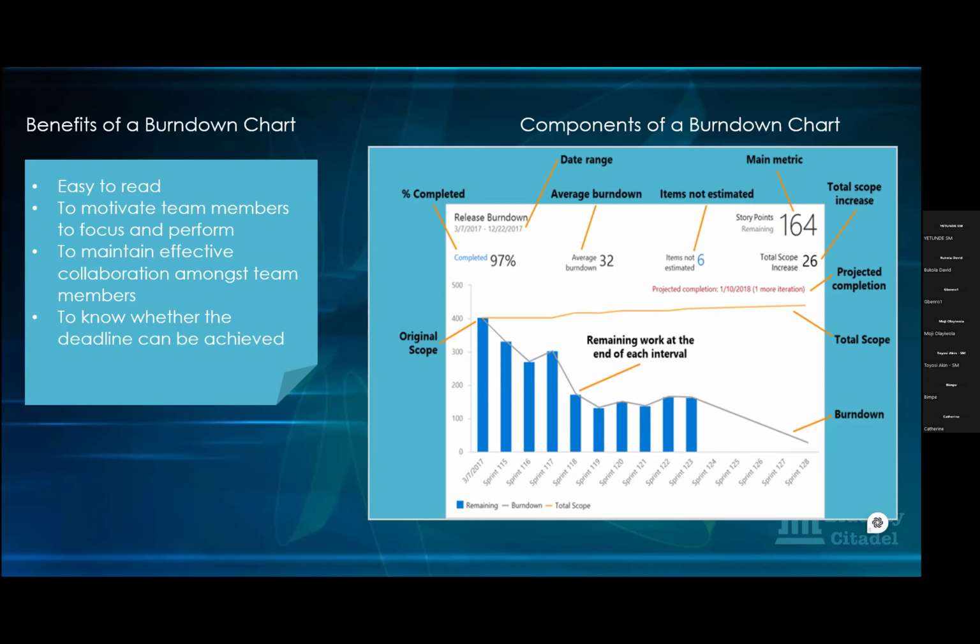Then at what point will it begin to fluctuate, like going down, once a story is closed? That's when it burns down. So if your developers have worked on a particular story, the QAs have worked on it, they forgot to close it, or the UAT has not been done, even though the developer and the testers have finished what they need to do, that story won't burn down. So it only burns down when it gets to the last column, when it's closed.